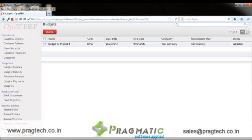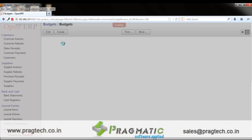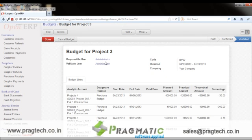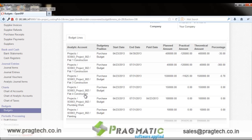Budgeting is a crucial part of construction. The user can define budgets for different projects as well as for each task. For Project 2 and Sale Order 3, all tasks are listed one after another and a planned amount is assigned to each task. Cumulatively this gives the total budget for the project. The practical amount is what is actually consumed versus the plan, and the percentage shows the variation between planned and actual spend.